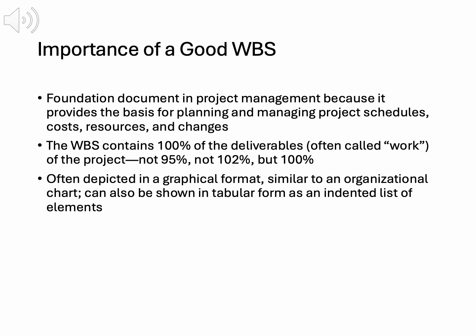A WBS is essential because it defines 100% of the project's deliverables, not 95% or 102%. This completeness ensures all work is planned, preventing gaps or scope creep. For the just-in-time training project, the WBS includes all tasks, from needs assessment to course delivery, ensuring nothing is overlooked.